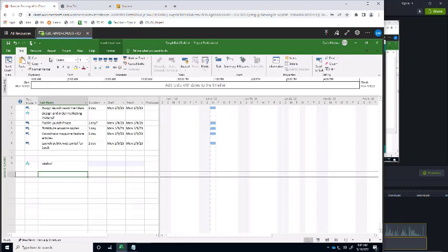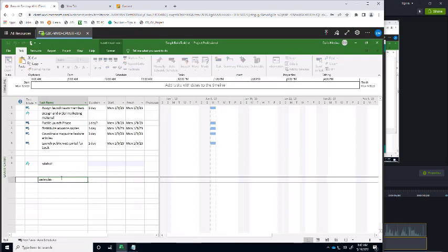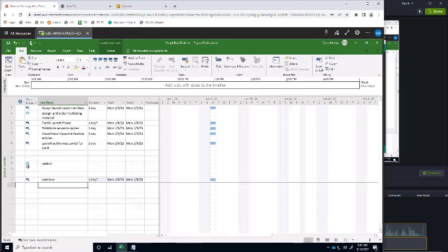How do you do that? You go again to task, the group tasks, and then under mode, the default is manual schedule. I'll change it to auto schedule now, and let's see what happens when I create a new task. Note that before, when I create a task, the default was this question mark. Let's see what happens when I hit enter. Now we switched the default in the mode. Now by default the newly created task will be automatically scheduled.